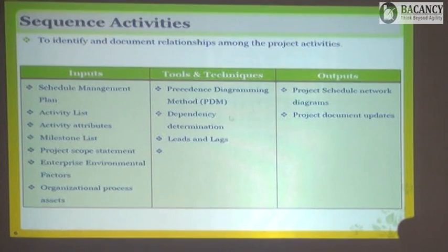So we will identify where we need to insert the lead time and lag time. First, let's talk about the lag time. Lag time is called a planned delay. Lag means delay. And when we are using it here, it is called a planned delay.